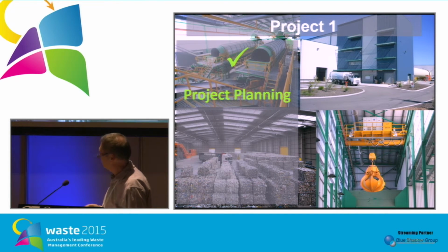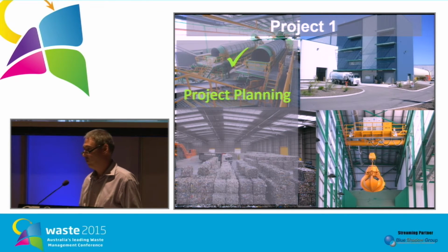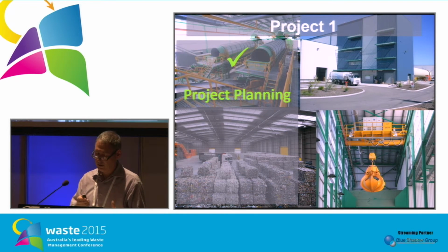So the positives in this one, that it was really good project planning. They'd done a lot of design, construction, and work around the operational costs, so they had all their costs well identified. They'd done a number of work around financial scenarios, looking at the what-ifs. If one council was to do it, if another council came on board and then another council, what did it look like? But they always had the option of just them doing it by themselves to give them a sort of bottom line to see if it would stack up if everything else went wrong.